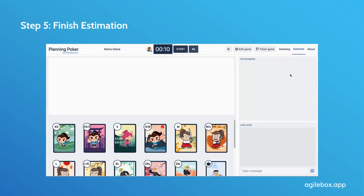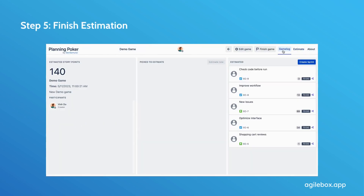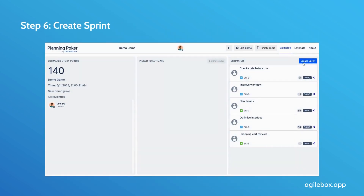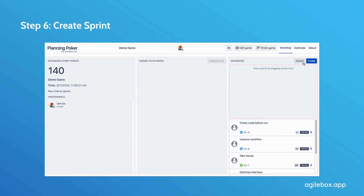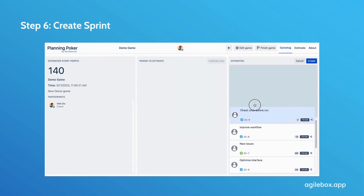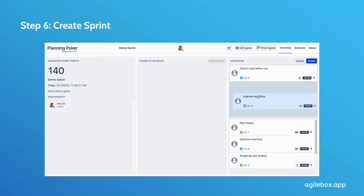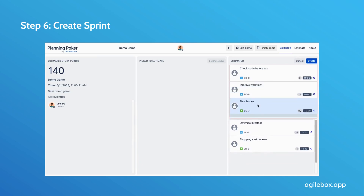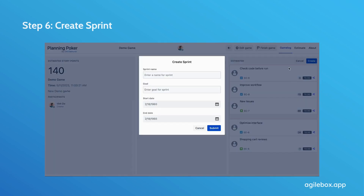Step 5: After your team completes the estimation session, click on the Game Log tab to find all estimated issues. Step 6: Now the product owner can decide whether to create a new sprint or not by clicking Create Sprint and simply drag and drop issues.